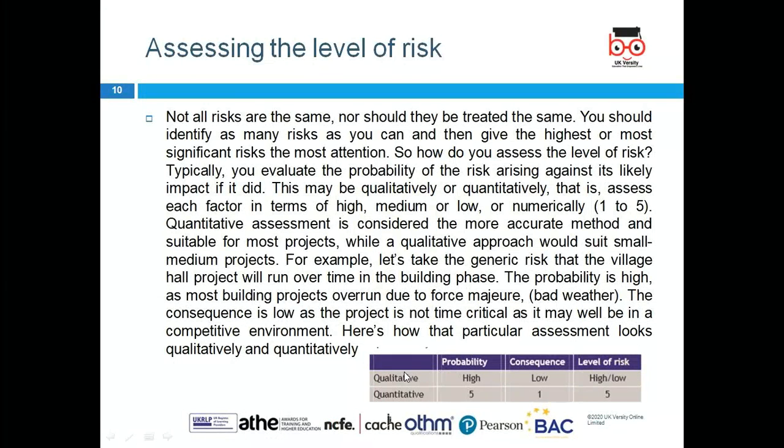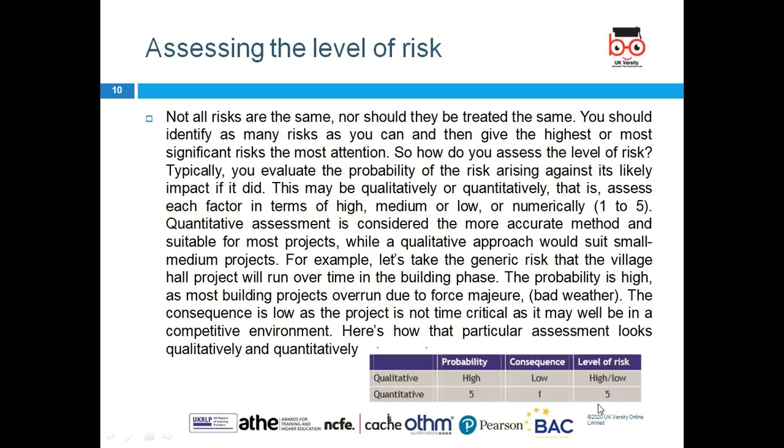Risk can be of two types, qualitative and quantitative. Yes, in numbers, you can rank them high and low, at the level of high to low. So you have to rank them and then you quantify and you try to minimize them. How you will do it, of course, there are different ways. Maybe you deal in different currencies. Maybe you use hedging. Hedge means if foreign currency fluctuates, we can get the guarantee from the bank, so our currency won't be affected.